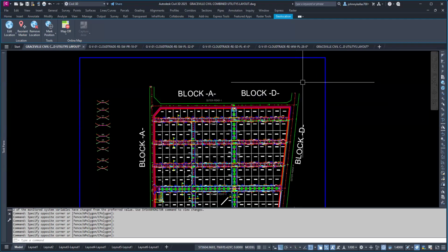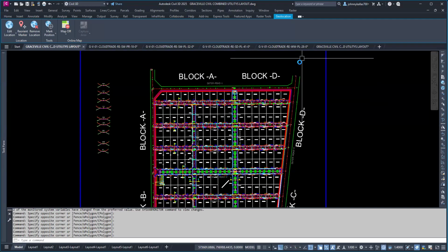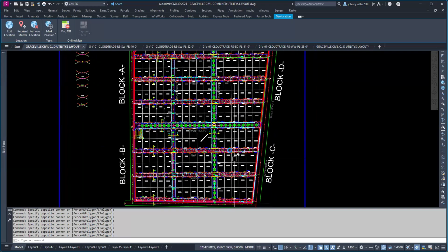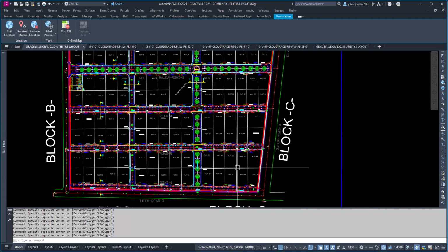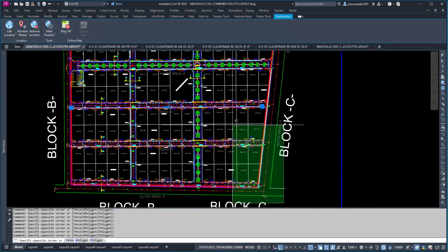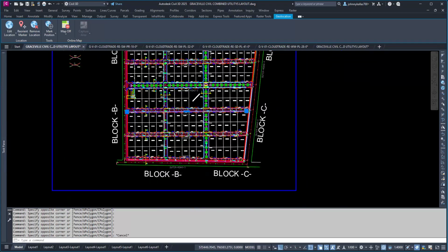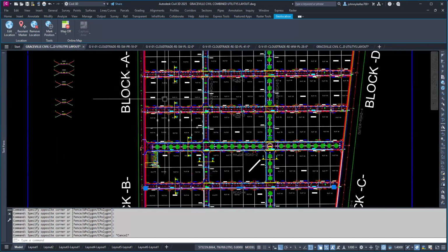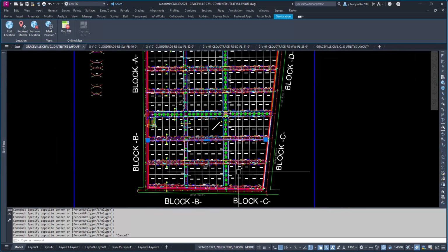Okay. We can, if you want, do another idea. After we finish backfilling our road, we can, for example, make this corner a stockpile. So the dredger can pump the sand for us here into the stockpile. Then if the owner of this plot wants to backfill it, we can remove the sand from here and sell it to him.